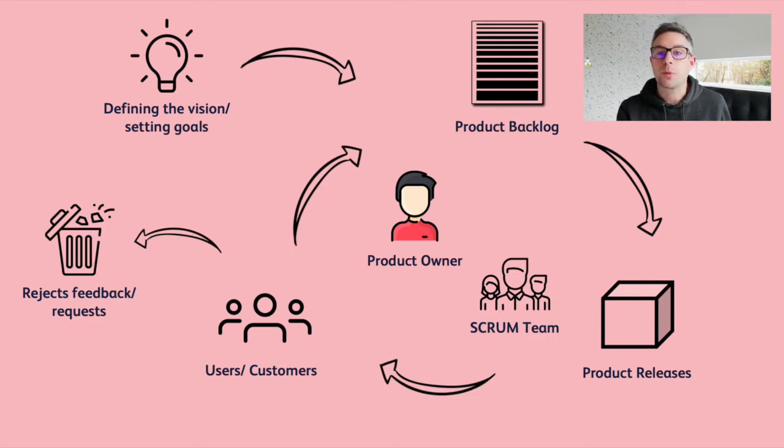And the responsibility of the product owner here is to ensure that that list is well understood, the details within the user stories are clear, and ultimately that they are prioritised. So the big long list of things that the team need to work on is actually structured and ordered so that everybody knows which things are the most important and which things should be worked on in which order.